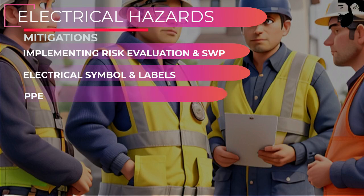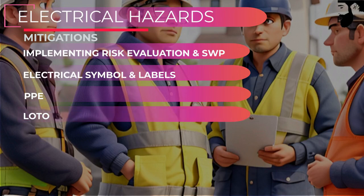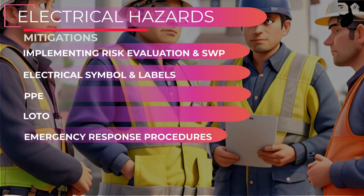Personal protective equipment (PPE) for electrical work, such as insulated gloves, safety glasses, and ARC flash suits, should be chosen and used appropriately. Lockout/tagout measures, which ensure that equipment is de-energized before maintenance or testing, as well as emergency response procedures in the case of an electrical incident, are examples of such processes.